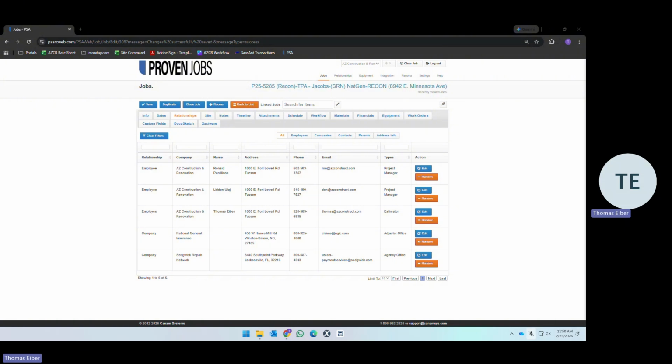Our fourth section that we're moving into is for deliverables. So things that you produce out to other entities and things that you receive as well. The main output for you, your deliverables, is job schedules. You'll be giving those to field techs and subcontractors, or you'll be communicating job schedules for subcontractors when they let us know that they are available. You'll be communicating those to the operations manager, so everybody is informed and it's on everybody's calendar as far as when that happens, so we can track progress on every job effectively.